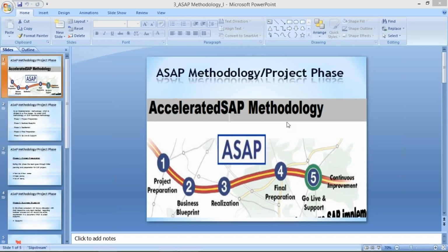Then in the second phase, the foundation will take place. In the third phase, all the pillars will be built. In the fourth phase, wall construction will take place. In the fifth phase, door and window installation will take place. In the sixth phase, it might be coloring, and then other decorations, electricity work, those things are going to take place. And at the final phase, inauguration will take place. Inauguration means the building is ready to be occupied by people.